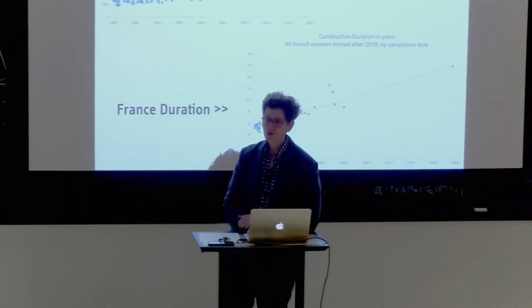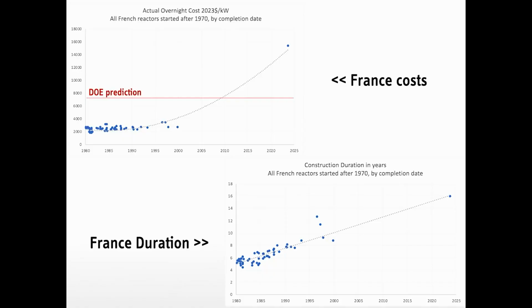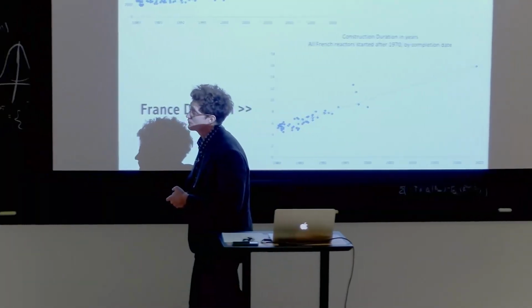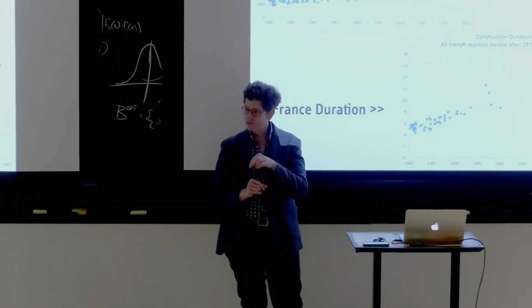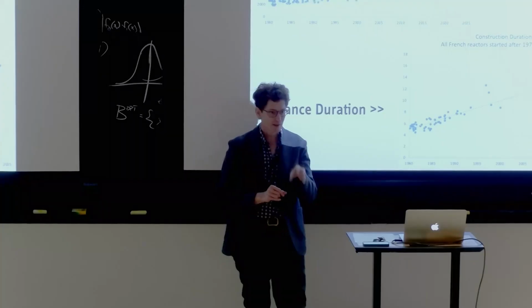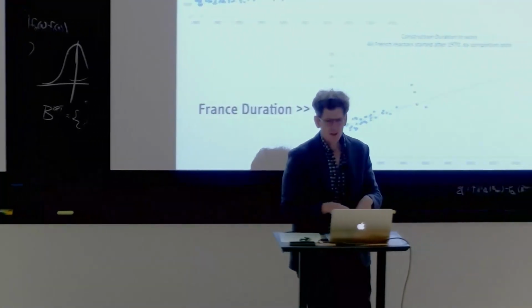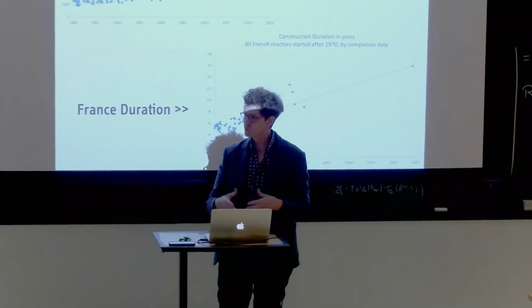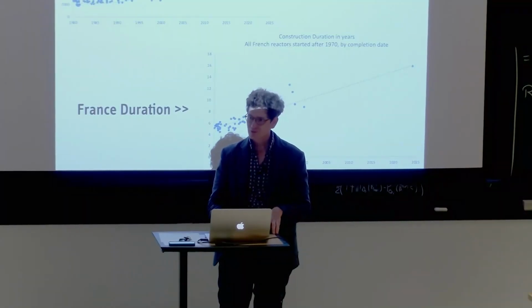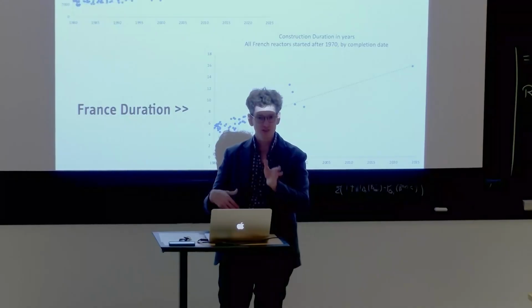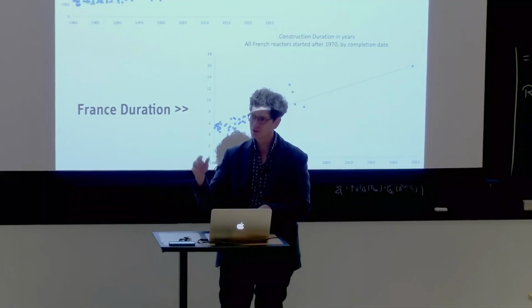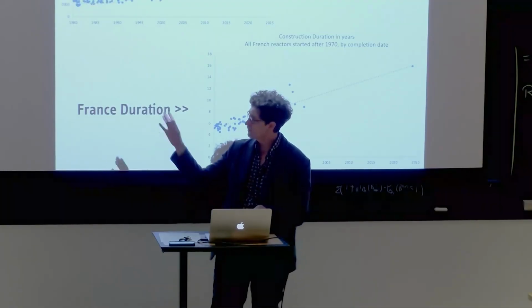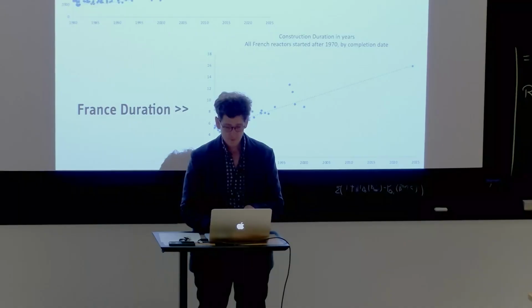All right. The more interesting question is, why were the earlier reactors cheap? In part, it seems to have something to do with standardization. There's more standardization in France than there is in the U.S. reactor fleet. They would just write for copies, so they kind of knew what to do. In the U.S., even though we had a notional standard design, like the Westinghouse 4 loop, every time it got built, it was different because things had to be adjusted for the site, and the owner wanted to connect it with a different turbine than the one it was designed for, and all of these other issues. So they have some advantages on that front.